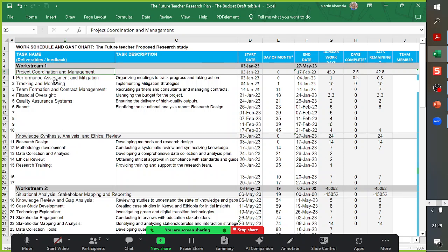But who will be in charge of the overall coordination of the project? You're saying now to manage across the teams. Again, that one we can agree. The assignment of roles, just to simplify the process, let's identify all the activities and we agree on them, then we assign the roles. It becomes simpler. Who will be responsible for what? Because if we do them simultaneously, it's more complex. But if we say, let's first of all identify the activities, we agree. Then we move on and say, now let's assign the roles. We also agree on that.